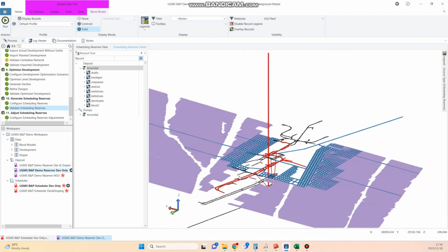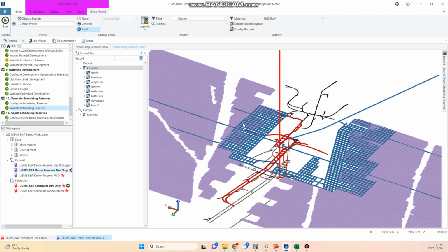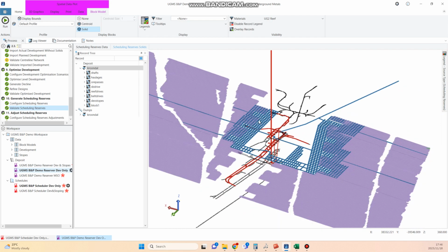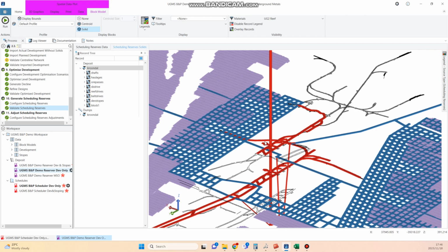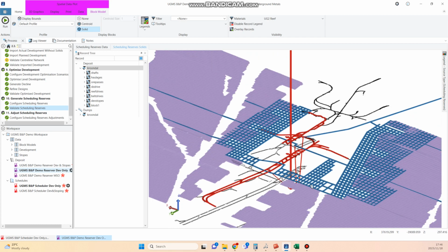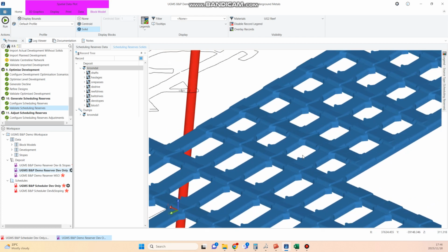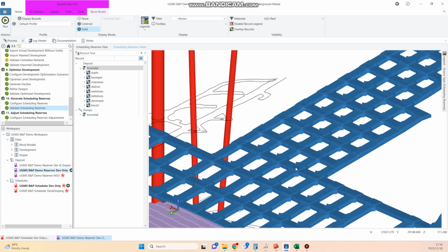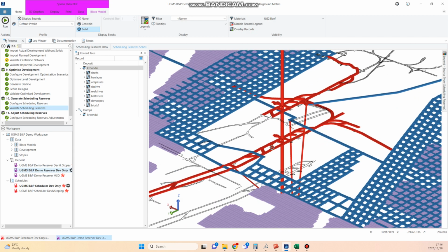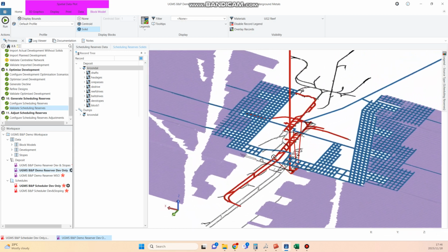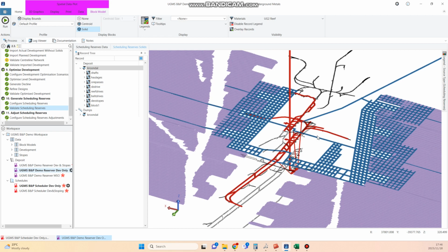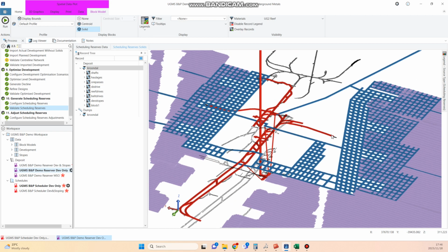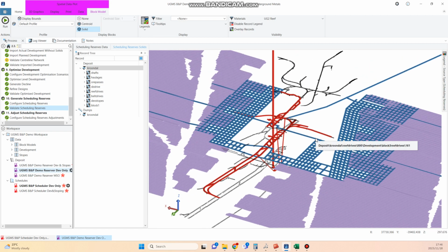And it basically creates these development drives for you. It's actually pretty simple. For this board and pillar section, I realized you don't actually need stopes. The whole mine is just development. So if you want to run different scenarios in terms of bigger boards and bigger pillars and higher roof and bigger intersections and so forth, you'll see here with my intersections, I actually lifted it by half a meter. So there's a whole bunch of variables that you can very quickly play with. And then you can schedule that and see what the timing is like, the tonnages and the volumes and the advanced meters and so forth. It's quite nifty to do that.